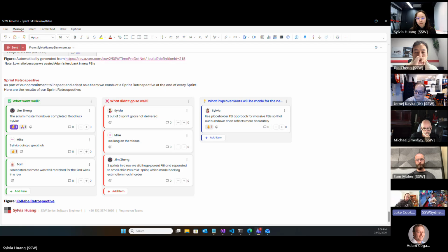The main goal of doing estimates is, for example, we all estimate adding this report on here, and then Thomas says that's going to be a 32. And we go, oh, what? Why is it so big? And he goes, well, I have to build this reporting stuff. And we go, oh, no, just use this component to do a PDF. And he goes, oh, if that's all I have to do, then it's a 2, right? Yep. And so just the conversation for estimates is the best thing.